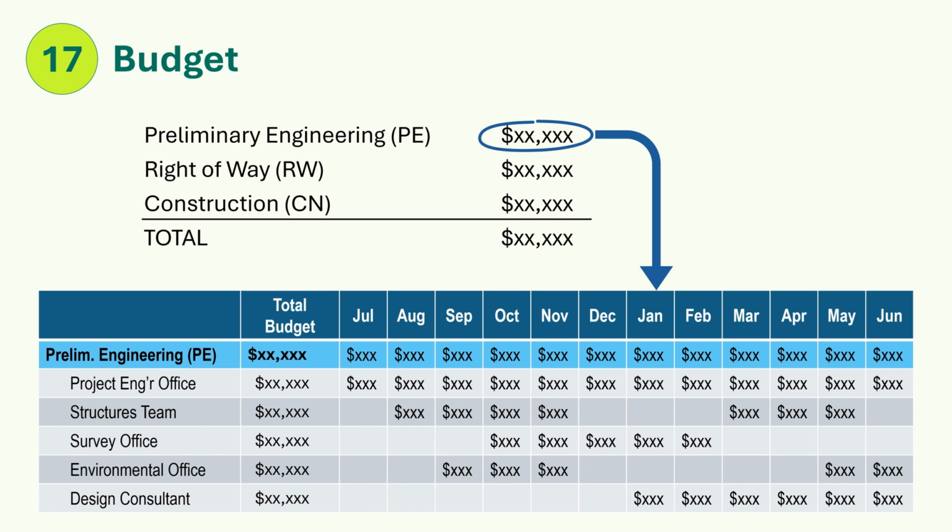Make note if any of the funding has certain restrictions on when or what it can be used for. An example is, some funds may be restricted to only being used during construction or only on fish barrier removal costs.